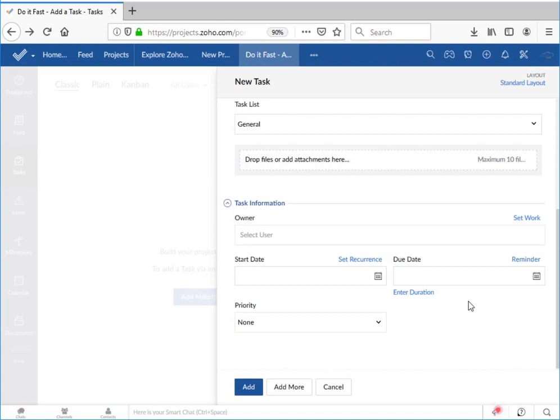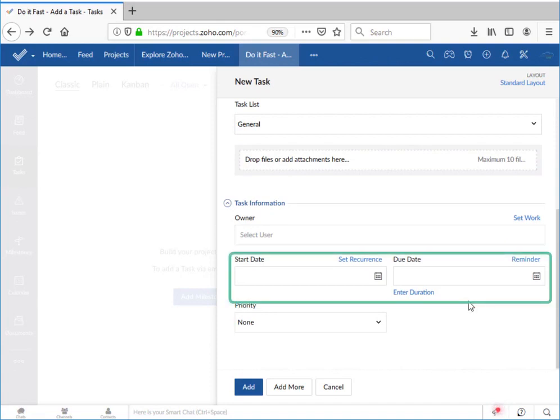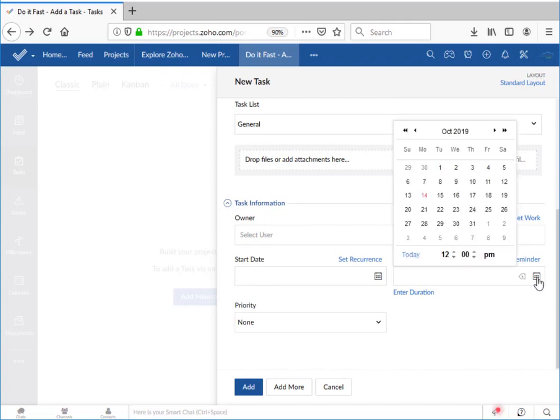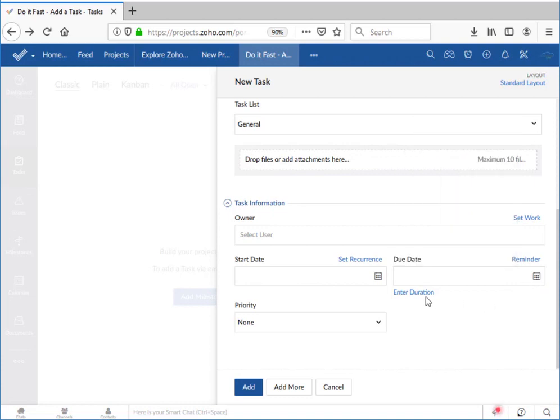Next, we have the start date and the due date. My preference is to start with the due date and work backwards. Zoho allows you to specify an actual end date or it can allow you to specify a certain number of days or hours until the task is due.